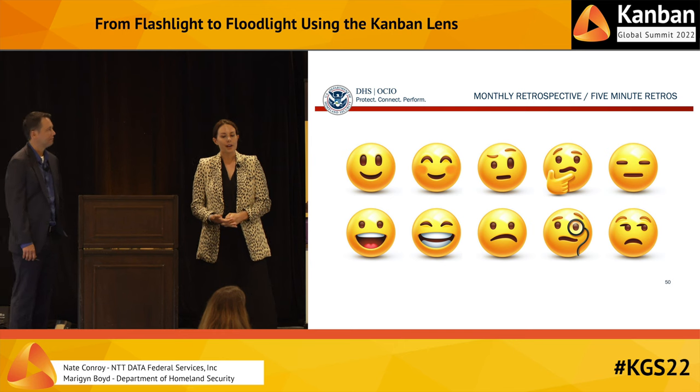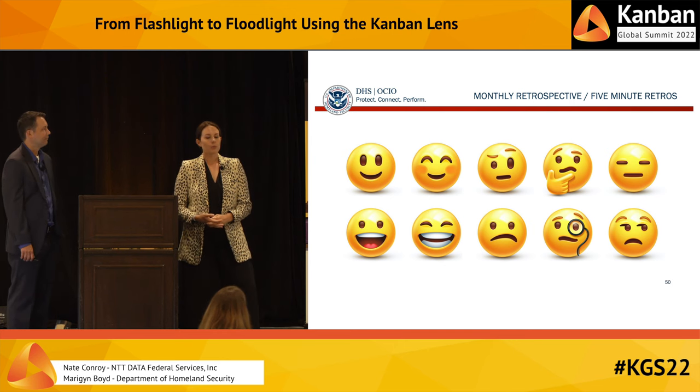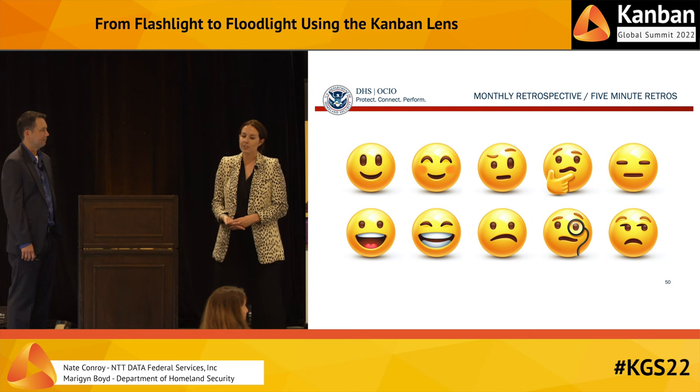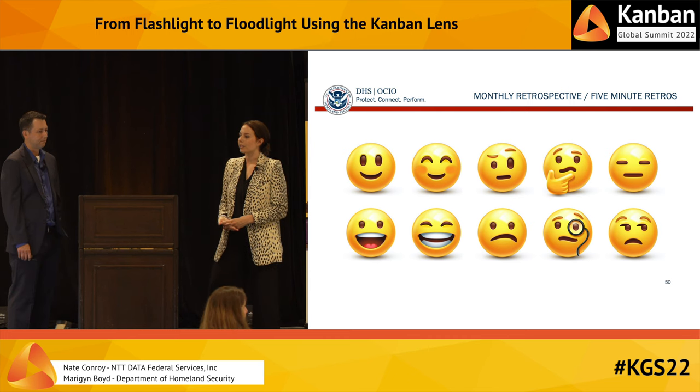We also have retrospectives. Monthly retrospectives were good, but we've recently added frequent 5-minute retros at the end of certain meetings. We found that those tiny improvement sessions have been even more effective than the longer meeting held less frequently.